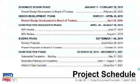Project schedule. We went through the schematic design phase in January and February, with our presentation on February 28th. Right now we are through design development, with our presentation today to y'all on the 25th. We have our construction documents phase planned from April through August 29th, with our 50% review June 27th and our 90% review on August 1st.